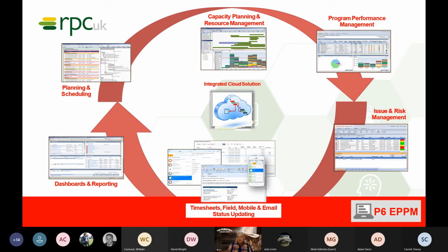And it's also got a risk register. What the EPPM doesn't do, it's got a very capable risk register, but it doesn't do the Monte Carlo risk analysis side of things. And you'll see that's one of the features when we get onto our Oracle Primavera Cloud that is included. So as you may be aware, the Primavera risk analysis tool, which was otherwise known as PERT Master,